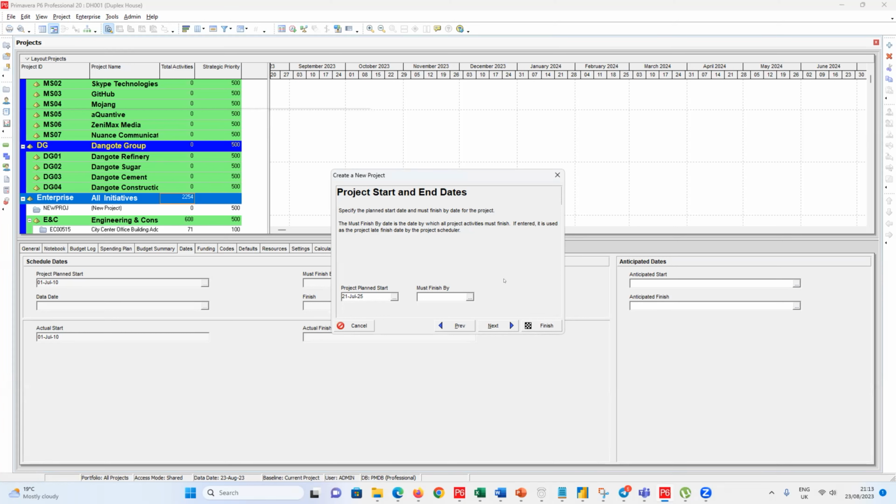That's why I mentioned, when I was teaching you about the success of the project, it doesn't depend only on time or budget. It's peculiar to the description. It will be predefined from the beginning that if we can hit that day, that project is successful. When the Olympics started, they believed they had made a success of this project, even though they tripled the planned budget. It doesn't count to them. All the people around the world are coming. This is when we're going to start, and this is where we're going to finish.